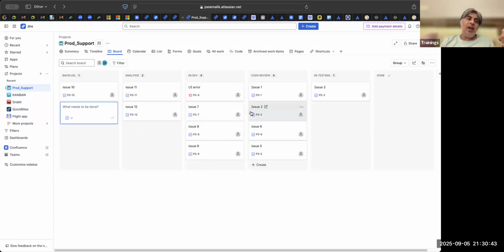So typically Kanban teams follow a weekly release cycle. Or that is one way, or they release on demand. Whenever a critical bug is fixed, they will deploy it into production. That also is a possibility. But let us assume this is a weekly cycle. Every Saturday morning, whatever is ready by Friday night, whatever is in done state, they are going to push it to production. Now, you are the Scrum Master of this team, and you see too many items in.